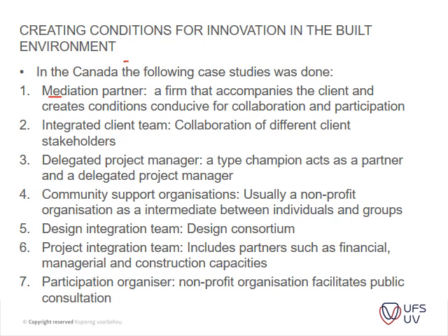And then secondly, you have the integrated client, collaboration of different client stakeholders. That is where a collective of stakeholders actually form the client, like a board of directors or so. Okay. Delegated project manager is a type of champion, acts as a partner, and as a delegated project manager. So this is usually someone that advises the client and gives them technical advice.